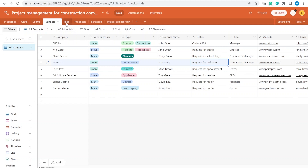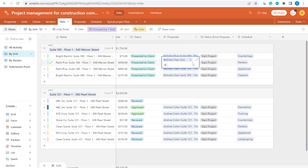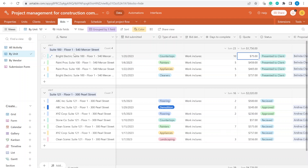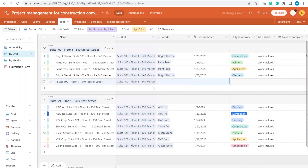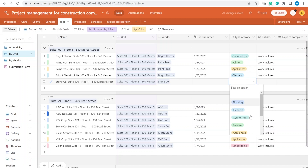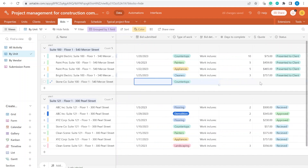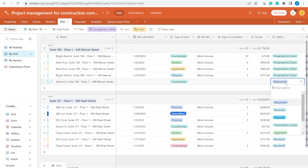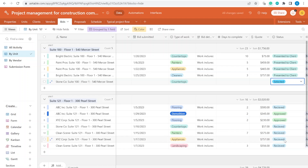Now we move over to another interesting part: Bids. In the Bids table we collect bids from vendors for a specific type of work for each project separately. For example, for one of the units we are collecting bids on how much vendors would charge us so that we can create a quote for our client. You can add another vendor — for example, for a stone company we are asking about countertops. You can mark the bid as Requested when you haven't received information yet, then mark it as Received once they submit, or as Selected if you want to present it to the client.